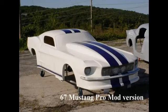Importance of budget setting. Project feasibility assessment. The defined budget helps assess project feasibility. If initial estimates exceed available resources, LJRC can explore alternative dyno financing options or slightly adjust project scope by targeting a slightly less powerful dyno model.